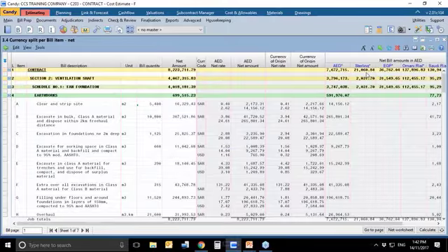Yes, it says that on this job, everything else has remained the same. All I've changed here is I've just gone and updated my currency exchange rate, or my factor, for Great Britain pounds, and it tells me that you would need much more. You would need 21,000 dirhams. Earlier you needed 13,000 dirhams to buy that amount of pound sterling. Now you need more money to buy the same amount of foreign currency.